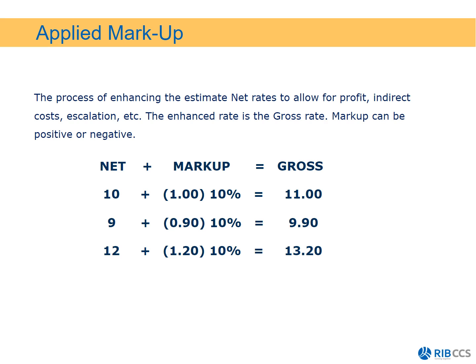Okay, so let's understand how we would go about applying markup, and what is markup. It is the process of enhancing the estimate's net rates to allow for profit, indirect cost and escalation, etc. The enhanced rate is the gross rate. Markup can be positive or negative.